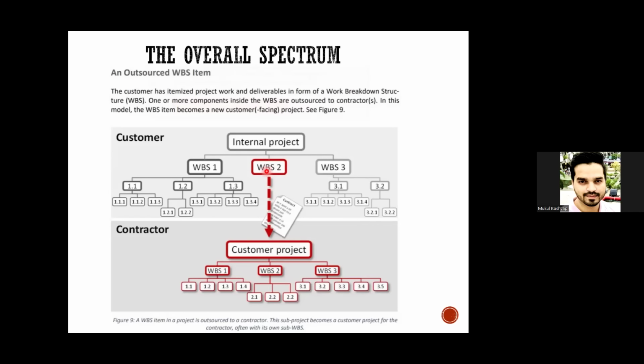Before you create the proposal and send it to the customer, do you consider the business case by assessing your gross profitability? For example, if you are deploying 10 resources for this project, these 10 resources will cost this much, this is my billing from the customer, and you calculate a gross margin. So during the pre-sales process, when you submitted the proposal, the business case happened.